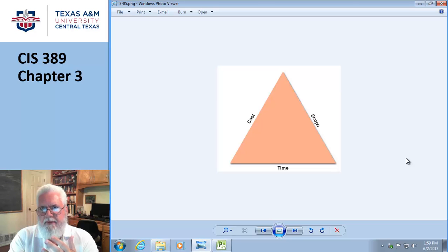by SAP, they use a WBS as a technique for assigning cost to a particular task. So this WBS code is a common thing that they talk about over and over again. This is not quite that specific, but the concept is the same. And the whole point is that you break something down into smaller chunks. And when you get to the smallest chunk that makes sense, that becomes a WBS.